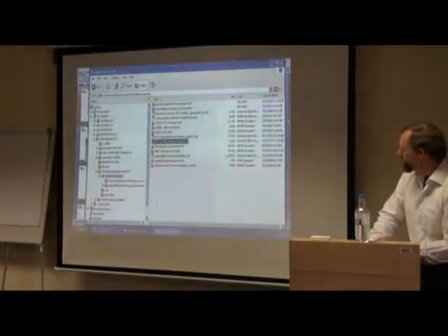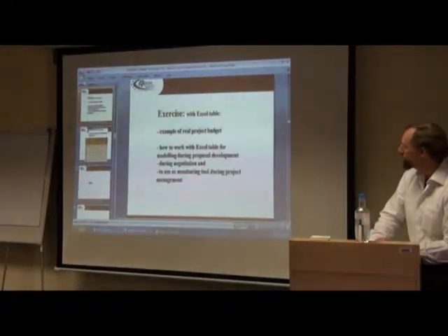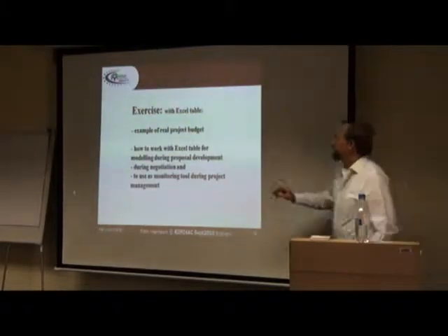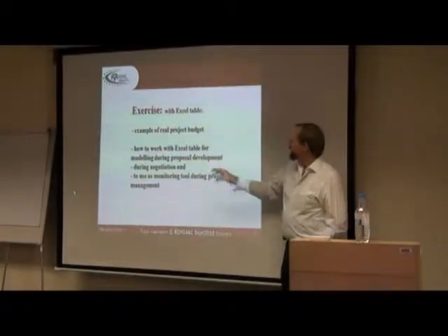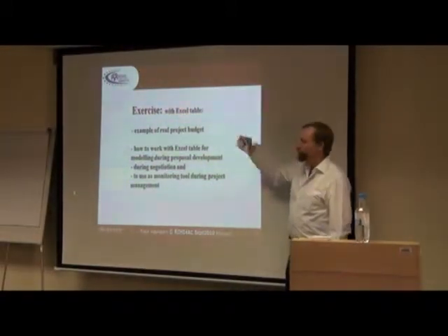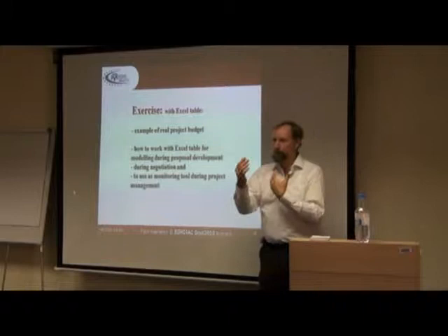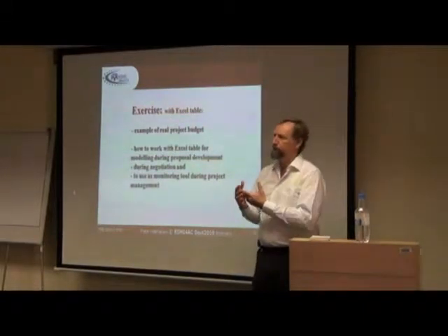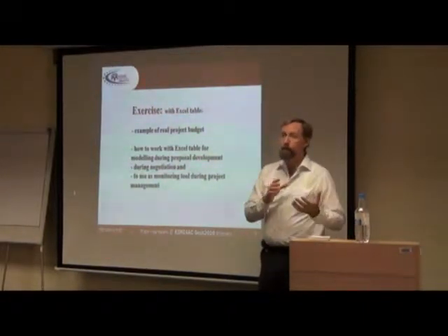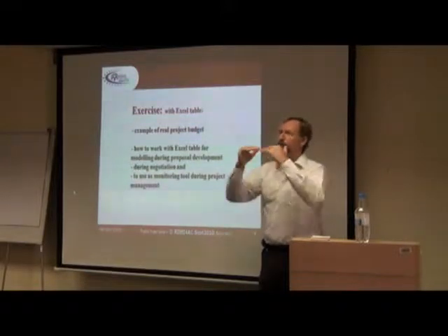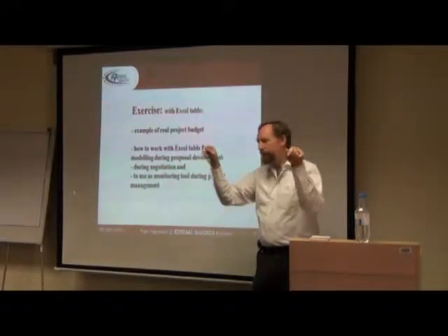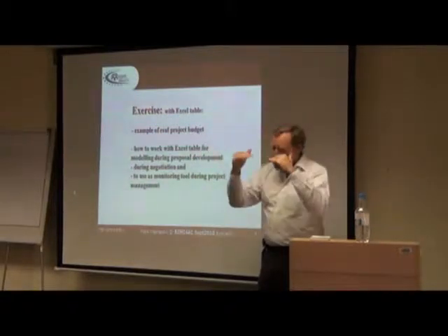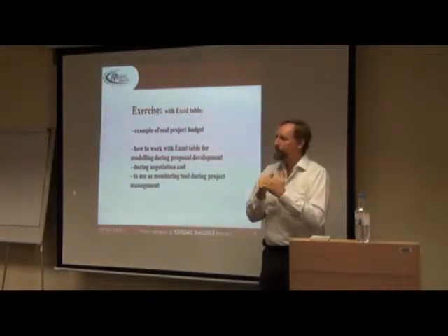Well, in the presentation itself, as I said here, it's an example, but it's freely adaptable. You can actually work with it to model and adapt your budget while you're building your proposal together with other partners. So if you need to stay below the maximum allowed in the call, for example, it says 3 million euro subsidy, you have to be underneath that ceiling.